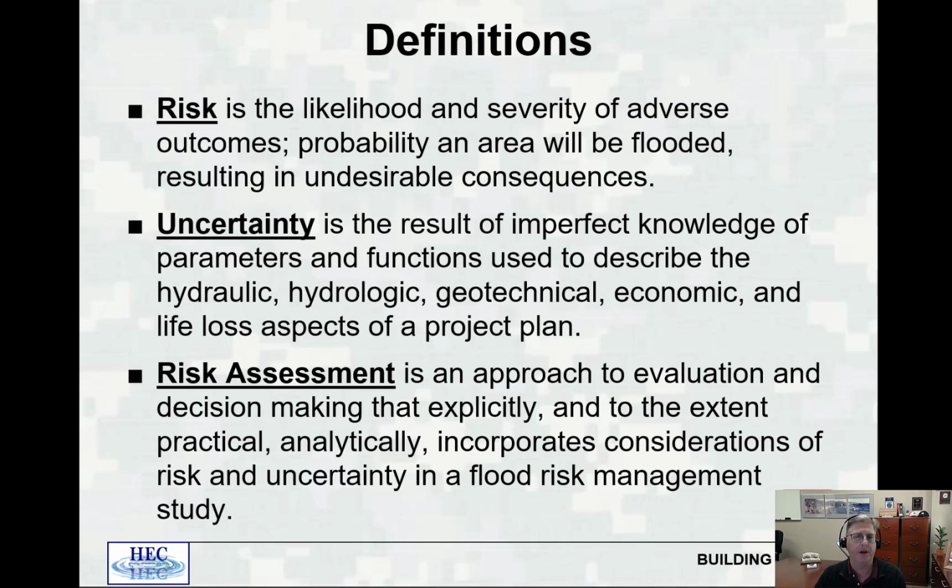Why is undesirable consequences important? Because you might have an environmental area where you want the floodplain to get inundated at a certain frequency. That's not an undesirable consequence, so it has less risk. So really, for a flood risk management study, when we define risk, we're talking about the probability that an area will be flooded, resulting in undesirable consequences.